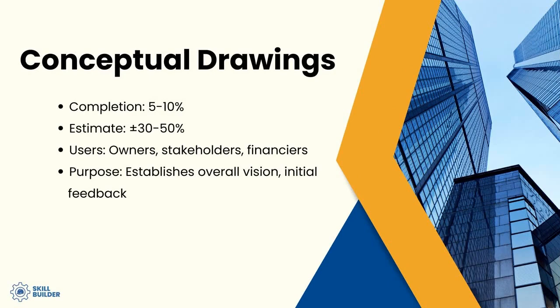When we're talking about conceptual drawings, we are talking about drawings that are usually somewhere between five to ten percent complete. These are going to be used for budgetary estimates or determining the feasibility of your project. These might even look like those napkin drawings of beautiful buildings done by a superintendent sitting over coffee with the owner at a Denny's restaurant. They do not have significant detail or a lot of information.